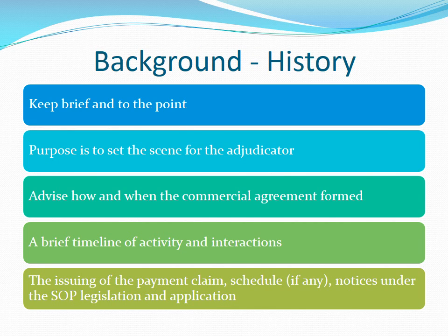As the name suggests, this section gives the background to the payment claim. Remember, it is the payment claim being adjudicated only, so keep information relevant. Keep it brief and to the point. The purpose is to set the scene for the adjudicator, to advise how and when the commercial agreement formed, and to give a brief timeline of activity and interactions, up to the issuing of the payment claim or schedule notices under the security of payment legislation and your application.